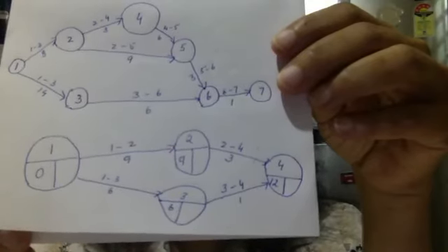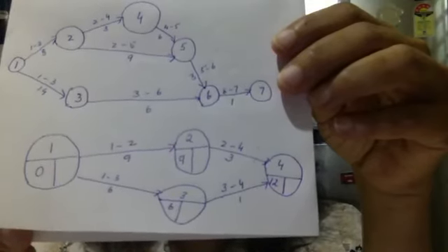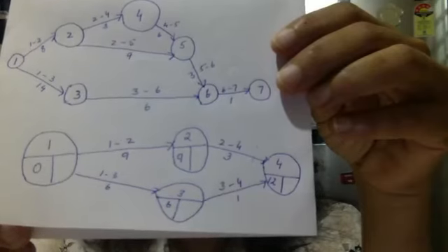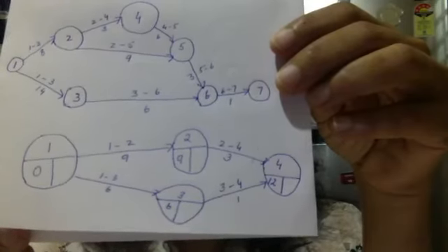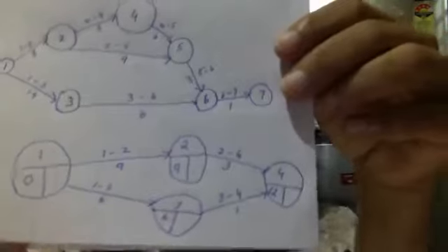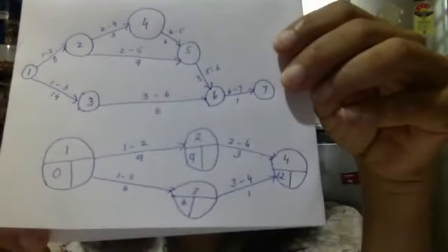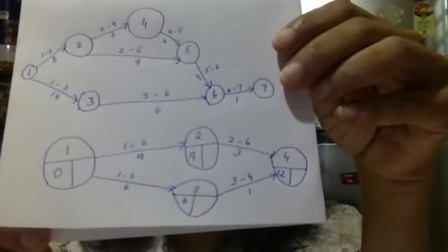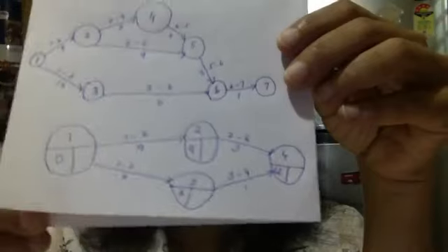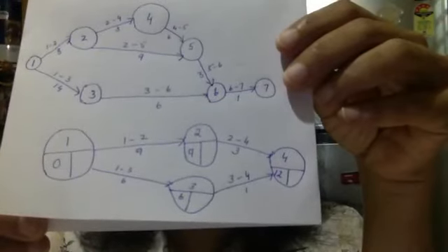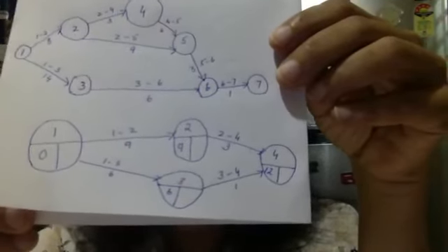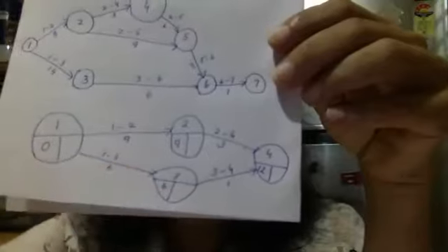When you go forward, you're not coming back from 4 to 2 to 1 or something like that. When you go forward, you must always take the larger number. Why? The events have to be completed before you go on. Did you understand? The events, I'm talking about the below 1 class.